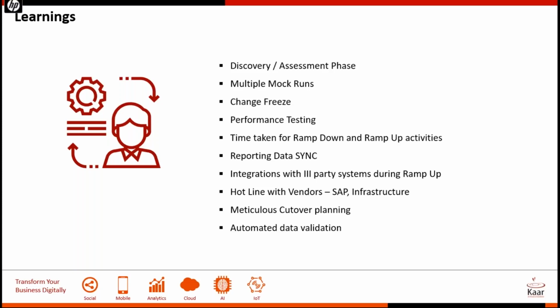The third one is the change freeze. So why would you need the change freeze? Let's say you have an ECC landscape, dev, QA, prod, and life is going on as business as usual. And now you've started an S4 conversion project. So you've taken a copy of production and put it in dev S4. And now let's assume fixes that come in production will have to be done anyway. You cannot stop those. But you don't want any new changes coming into your ECC landscape, for 2 reasons.